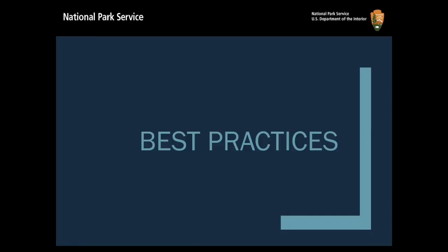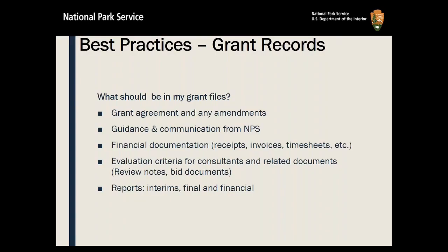Best practices. What should be in your grant files? Grant agreement and any amendments, guidance and communication from NPS, financial documentation, receipts, invoices, timesheets, etc. Evaluation criteria for consultants and related documents, review notes, bid documents, reports, interims, final, and financial.